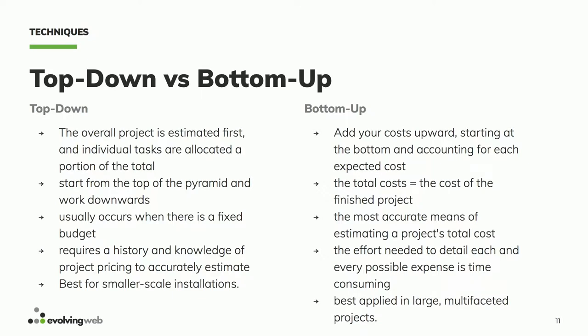So this is the top-down approach, and it's very useful because when you're doing projects that are similar to what you've done before, you can just kind of compare. And then there's the bottom-up approach, which is that you start listing all of the deliverables, all of the phases of the project, which includes discovery, content strategy, UI design, UX design, however many meetings you're going to have for that, which reports you're going to produce or slideshows you're going to do. You're going to include a kickoff meeting and how many people will be present.